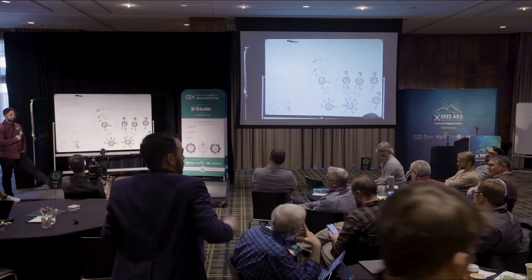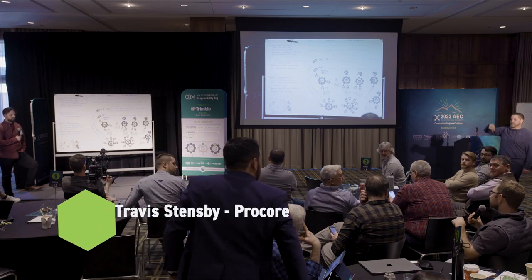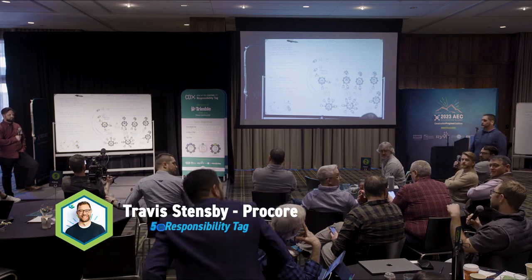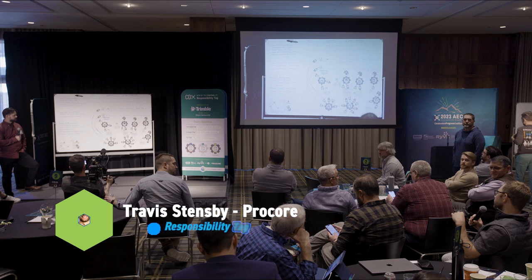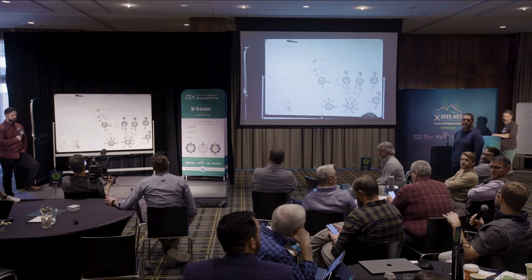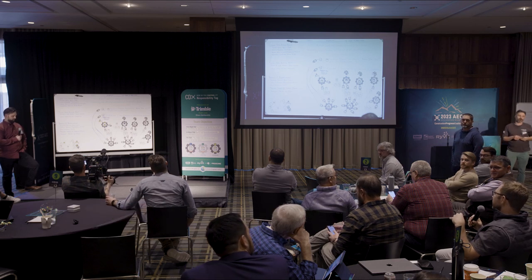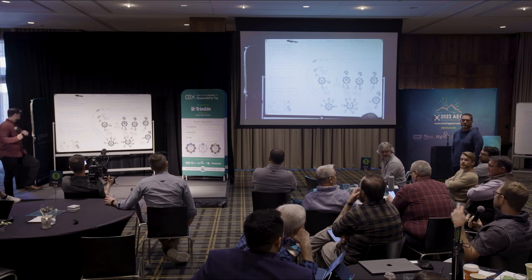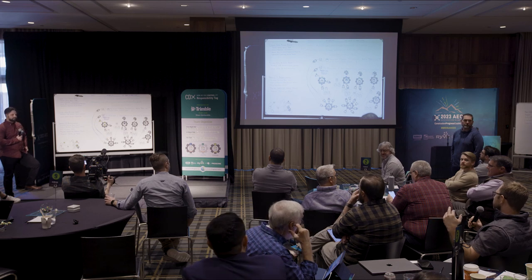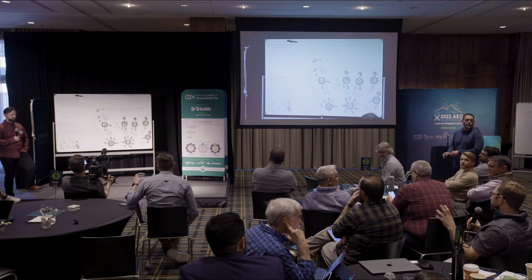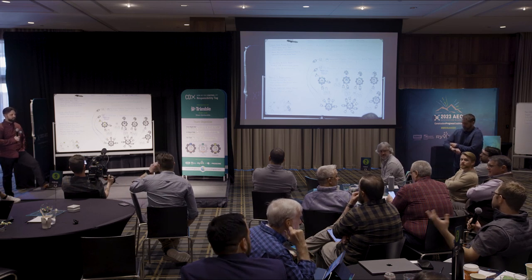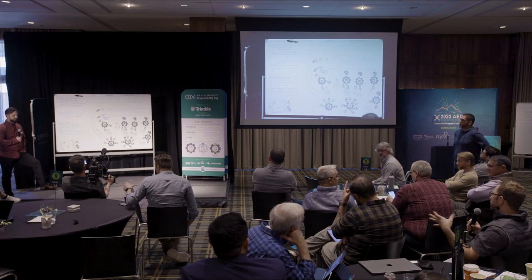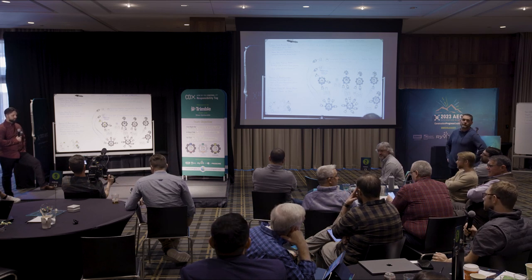A critical part of this is knowing up front what's going to be submitted and who's going to review it. The package becomes less of an issue if you know the items and who's responsible. When what's going to be submitted is agreed upon early, it's easier to track through the CDX.